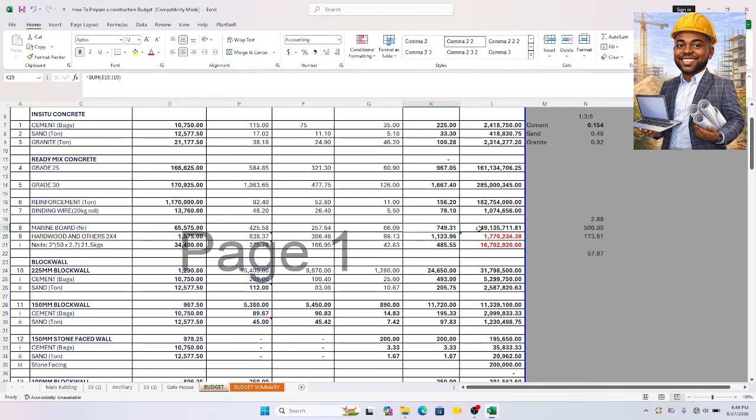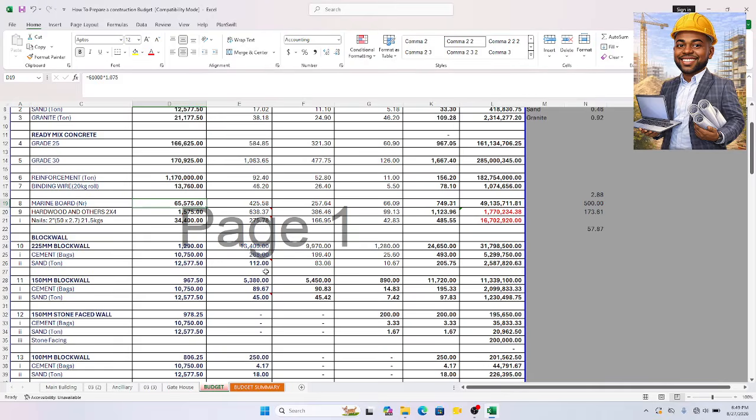So this is the total multiplied by this. As at this time we use the formwork for 61,000 naira. So it will conveniently and convincingly cover you for 3 uses, depending on the number of floors you have. If you buy the one for 25 or 20 or 30,000, you may not be able to use it for 3 uses because it's going to get destroyed after the first or second usage.